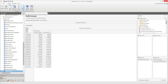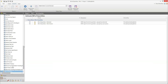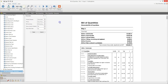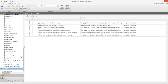If you're using the estimate professional QS version of BuildingWorks, BuildingWorks has also automatically produced elemental and works section bills of quantities without you having to type a thing. Navigate to the bill of quantities on the project explorer to take a look. Finally, let's take a look at the quotes. Click quotes on the project explorer. As with the reports, you need to ensure your estimate is complete and your build program is set up before you produce a quote.